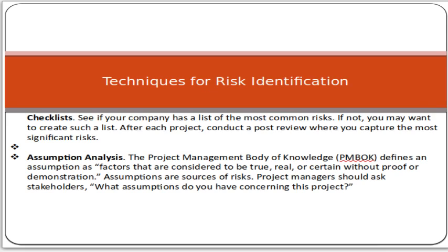So you can try to use that list to check, for example, if there are five risks that occurred as per the past projects of e-commerce solution during the implementation of e-commerce solution. So you can find that checklist and compare it with your checklist, to see whether any risk mentioned in the company checklist is not mentioned in yours. So you can use the checklist as well.